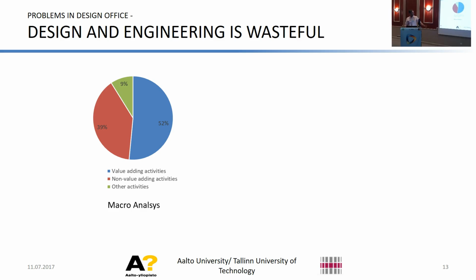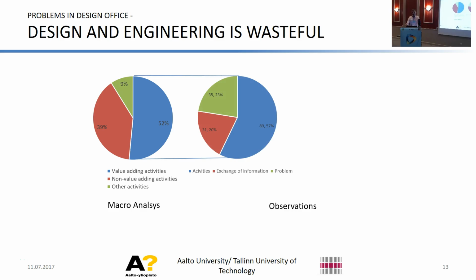Therefore, based on this data, it seemed like 52% is a value-adding activity. No one believes it. So we observed the design project over 8 weeks. We had a master student following all the designers and engineers and asking them why they did what and how, et cetera. And then we understood, okay, you can divide this 52% into another 57% for design